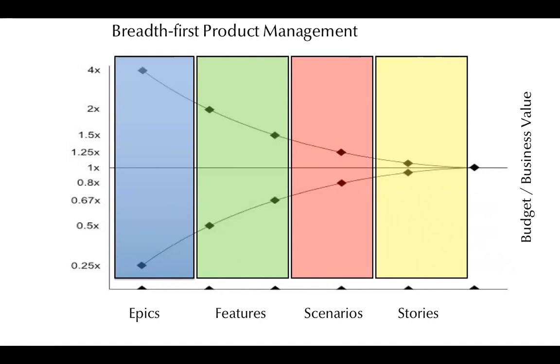So this is where we get into something weird. The scenarios come before the stories. Well, we're talking BDD. BDD attaches scenarios to features. Features are the atoms of release planning. If we can work at that level for most of our analysis activities, most of our product squad work, and only worry about breaking a feature down into stories when we're about to go and deliver it.